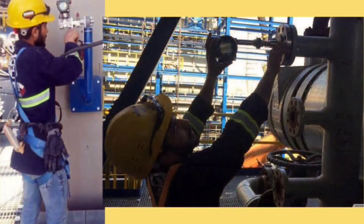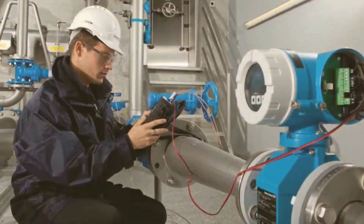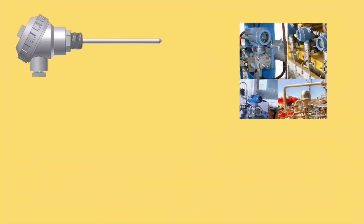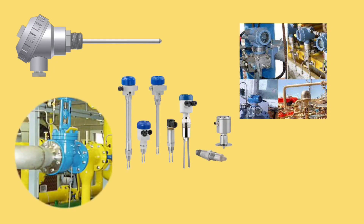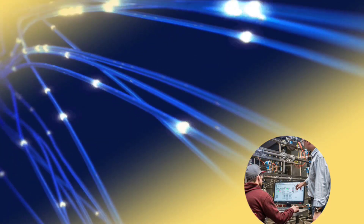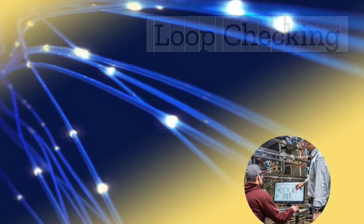Getting the instruments operated properly after installation is called commissioning. This means checking whether whatever transmitters, RTD, thermocouple, switches, and control valves we have installed — their signal is being shown on PLC-DCS or not. All this is seen in commissioning. There are many signals which are not properly shown, so loop checking is also done for this.